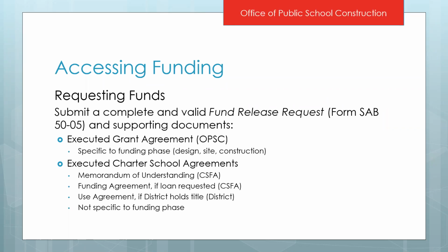You also need to execute your charter school agreements. These are agreements that are just specific to the charter school facilities program. All projects will have a memorandum of understanding, and if you are taking a loan for your match, you will have a funding agreement. Both of those forms are created by the California School Finance Authority. If the district holds title to the project, you'll also have a use agreement, and the district is responsible for creating that. Now, these are not specific to the funding phase, so once you execute these, let's say to request design funding, you don't need to execute them again to request your construction funding.